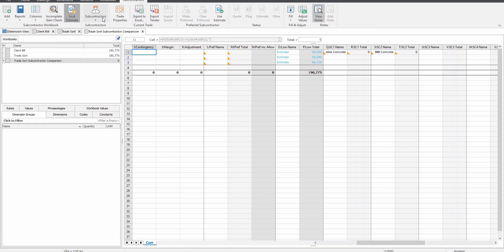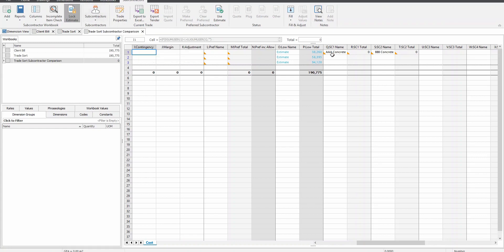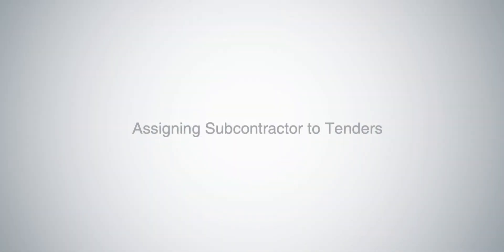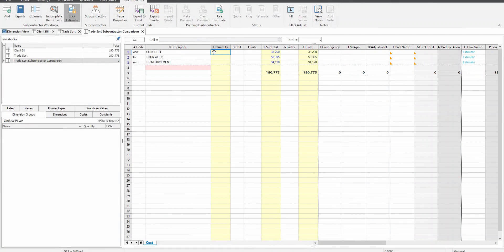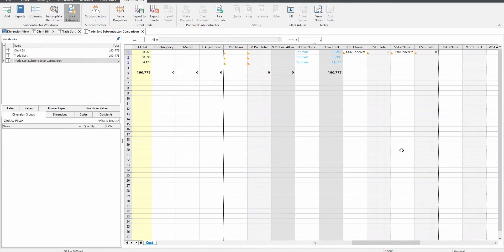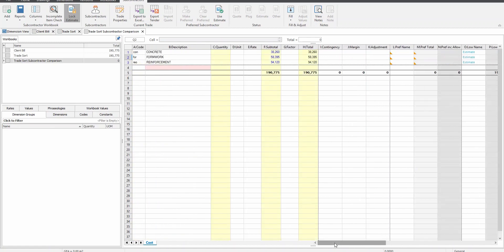We can also see that although no data has been entered against estimate price for any subcontractors, the lowest columns have been prefilled with the estimate total. After the subcontractor comparison workbook has been created, the first thing to do is assign subcontractors to trades. Notice that the two subcontractors which we have added into system administration have been automatically added to the concrete trade in columns Q and S. This is because we nominated concrete trades for them both when we added them. Now we want to assign subcontractors for formwork and reinforcement trades.